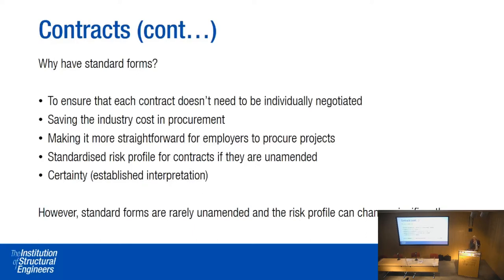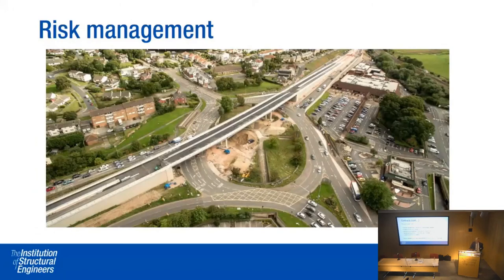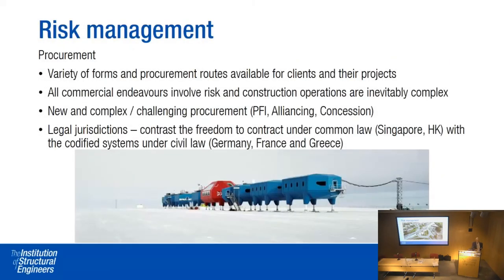The reason we have standard forms is to ensure that each contract doesn't need to be negotiated individually — it saves industry cost in procuring projects. Standard form contracts also provide a standardised risk profile: who's responsible for weather conditions, ground conditions, insurance arrangements. And they have certainty — where there have been issues in the past, they'll have been to court and a judge will have decided how to interpret them. The problem is that standard forms are quite often amended, and the risk profile can change significantly.